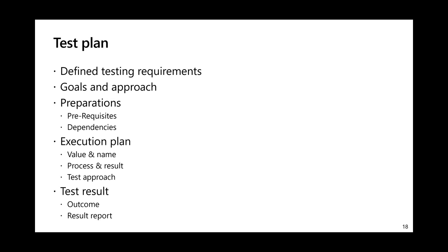And then I have dropped the preparation in session. I have listed out all the prerequisites and dependencies because a lot of things you can confirm yourself. Something needs the customer to prepare and provide. If there is any dependency on another party or another team, we should call it out in the document: what you need, what you expect, ensuring the team is aware of the preparation in the test plan.